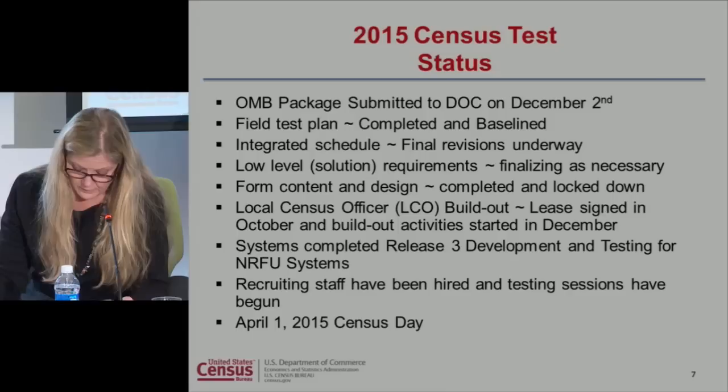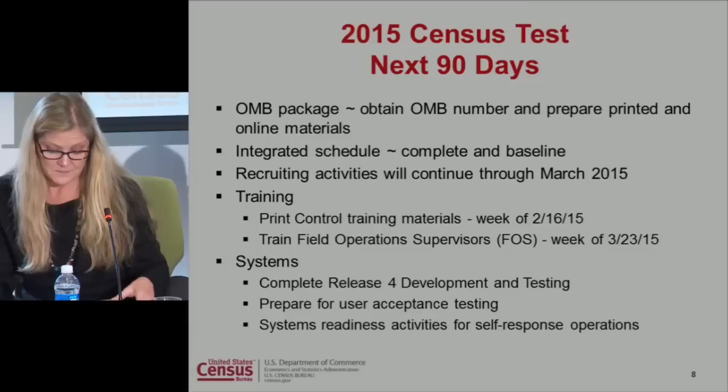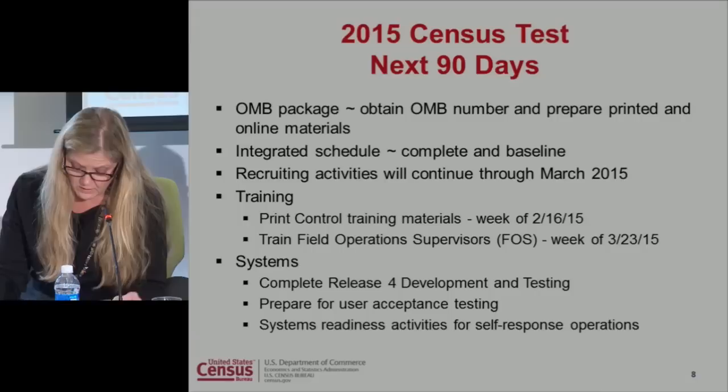We are recruiting staff that began, and testing sessions have also begun. And we are on track for our April 1st census day. In the next 90 days, we will obtain the OMB number and prepare printed and online materials. We'll finish the tweaks that we're going to make to the schedule, as mentioned earlier. We're beginning our recruiting activities, and that's going to continue through March of 2015.